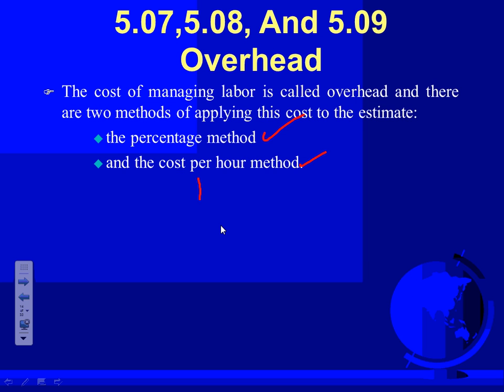The project, guys, we allocated $13 per man hour or woman hour, right? You can also allocate 15 to 30% to overhead. What's overhead? Overhead is the cost of managing the labor, and also running the offices, turning the lights on, right? So you have to accommodate for that recoupment.